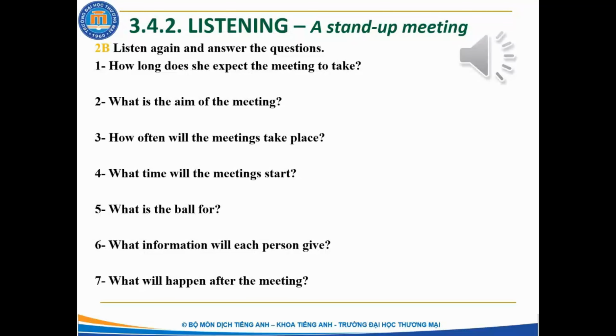This is a new type of meeting for most of us, so I will just explain what we plan to do. It's very simple. I will start by throwing this ball to a person. The person with the ball then gives the rest of us 3 pieces of information. 1, what they did yesterday. 2, what they plan for today. 3, any problems or impediments that they see.